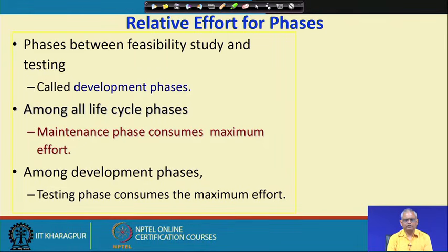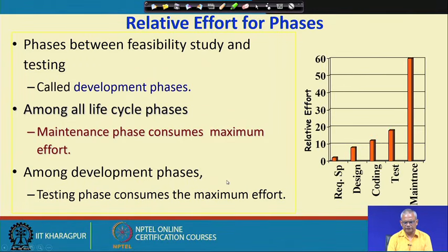And for almost every software, the maintenance requires much more effort than the development effort itself. But among the development phases, the testing phase typically consumes the maximum effort.